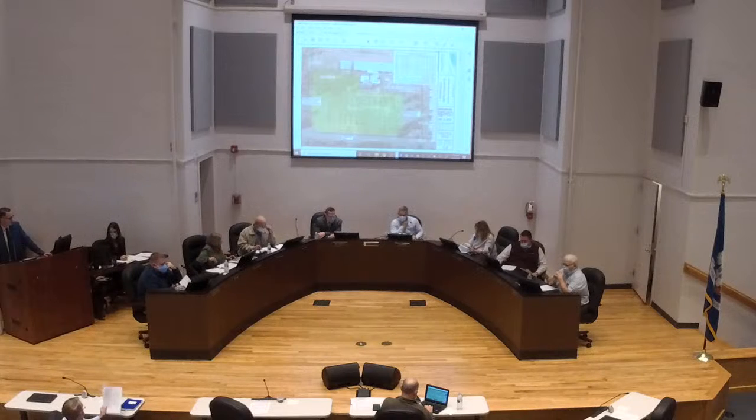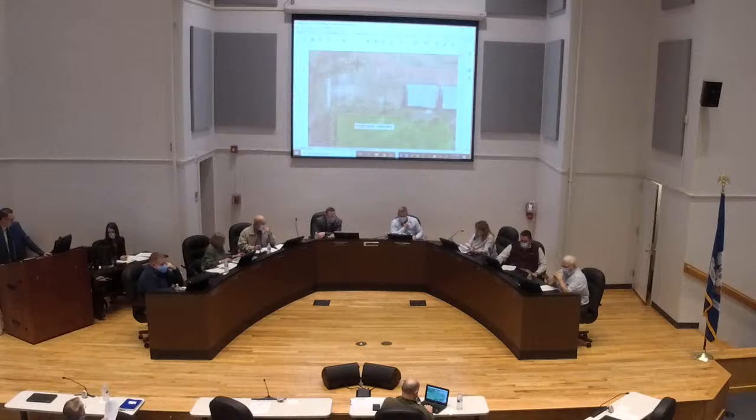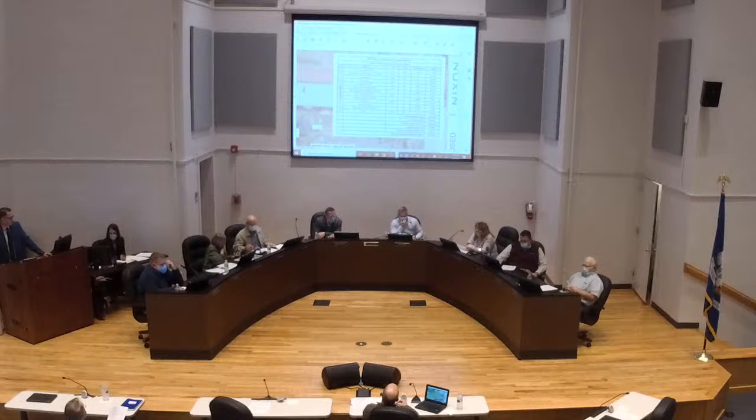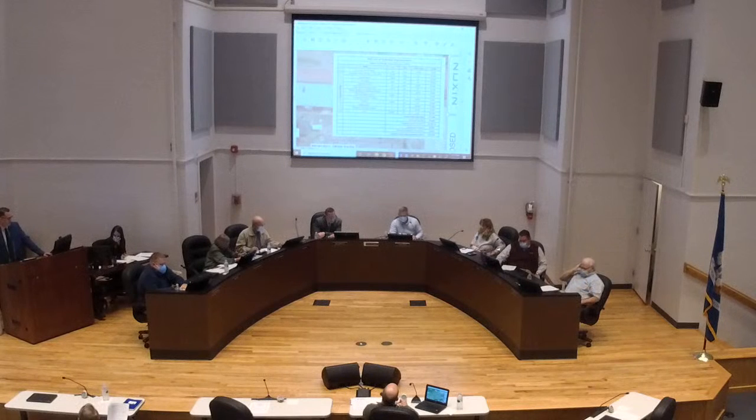Yes. I apologize that there's so much information it doesn't read well. This is what I sent to you on Friday. This is just a general takeoff of what's included in the construction cost, which is clearing, grubbing, excavation, embankment, drainage pipe, basins, retaining wall, some demolition of existing lighting, electrical, and fencing, erosion control, and so forth. And the project cost here with contingency is around $400 and some odd thousand, but then when you add the professional fees and surveys, it goes up to about $479.